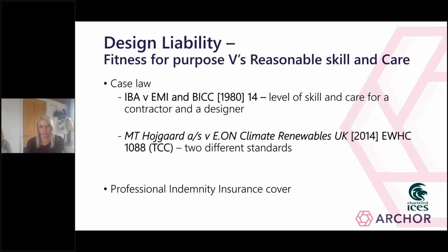The more recent MT Hogarth case considered what happens where a contract includes two differing standards of care. So this claim related to a large wind farm, which is known as the Robin Rigg Wind Farm. Unfortunately, the grouting to the foundations failed. It turns out, very unfortunately for the contractor, it was actually accepted that the design carried out at the time was to recognised industry standards. The issue for Hogarth was that those standards were not themselves correct. The cost of the repair was some £23.6 million, so it was a very important case for everybody involved.